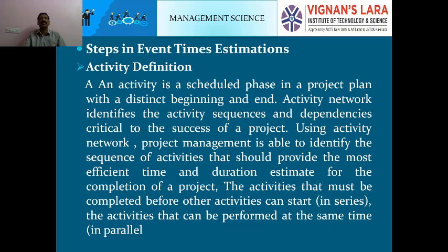A series of activities can be linked with a series of events. Without events, there is no activity. Without activity, there is no event. That is the fundamental concept of network analysis. Parallel activity is to be followed. Otherwise, there is no way to make a comparison for the identification of critical and non-critical activities.